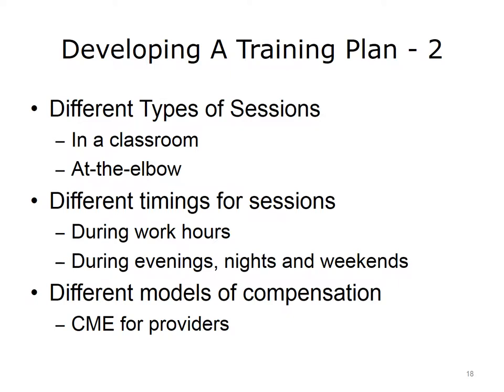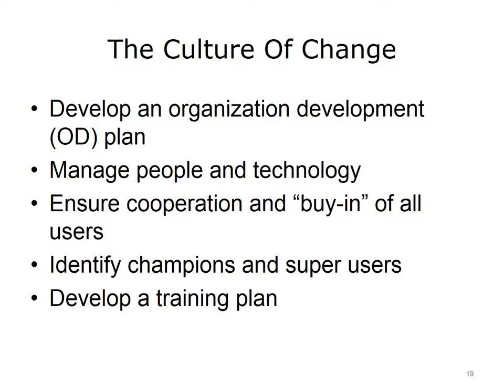To improve buy-in or cooperation for training, particularly during non-work hours, end users especially clinicians may need to be compensated for the time spent in training. One method could be to provide continuing medical education (CME) credits for physicians. Other organizations may want to financially compensate physicians for their loss in productivity, or determine other options to compensate clinicians for lost time from providing patient care. The concept of change and the culture of change are important to consider before an organization embarks on a major change. The introduction of an EHR is often the fulcrum around which significant change occurs within an organization. The OD plan should include both the technology and the personnel that need to be managed, as well as ways in which the buy-in of end users can be cultivated.